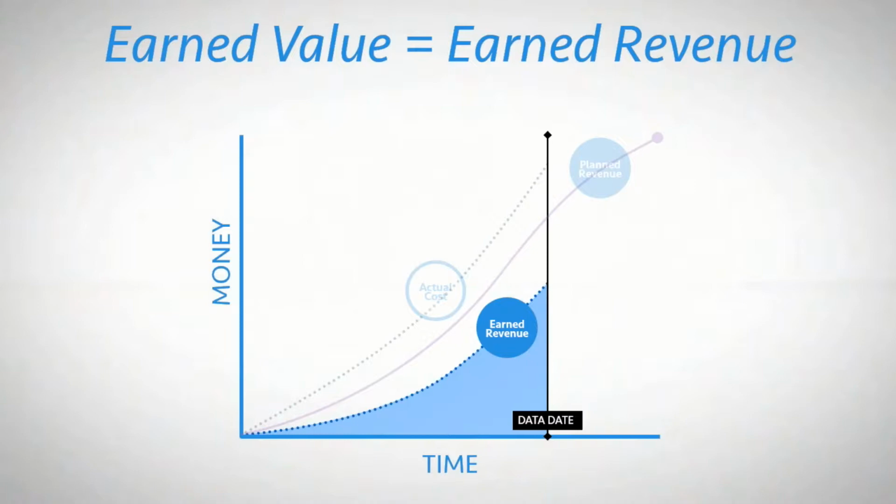Expense charges, on the other hand, like travel, printing, or sub-consultant expenses, may be converted into revenue via contracted expense multipliers or unit pricing schedules. Revenue may also be earned as project managers assess percent complete or estimate at completion across the project work breakdown structure. These assessments are often done on a monthly basis and often stem from progress to date and how much work remains.